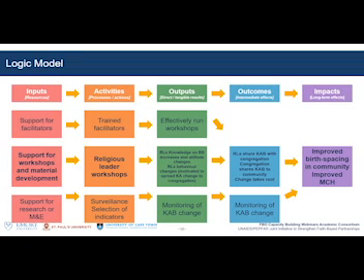As we thought through how to demonstrate in the training of trainers how to achieve an outcome that showed the capacity of the trainees to go back to their organizations and implement activities, we built in as an evaluation measure and a curriculum measure their work in the last session on the development of an action plan, with logic model or action planning components to it, so that became both a measure of an outcome, but also something that could track outputs into the future.